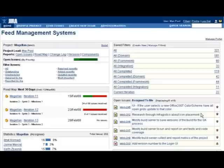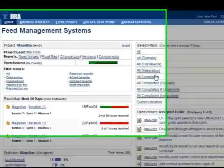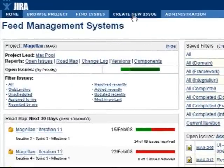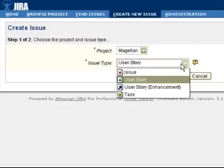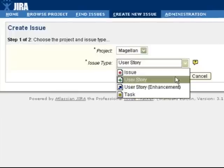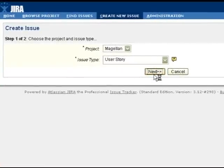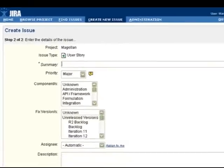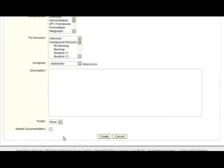So that's kind of the first step of customizing your bug tracker to help you automate your point automation. And the first thing that I actually did was I created a user-defined field in JIRA with the Fibonacci-like series points in it, or the planning poker points. So to illustrate that, if I go to create a new issue here, and these are customizable as well, issues, user story, tasks, that's what I created for my team.